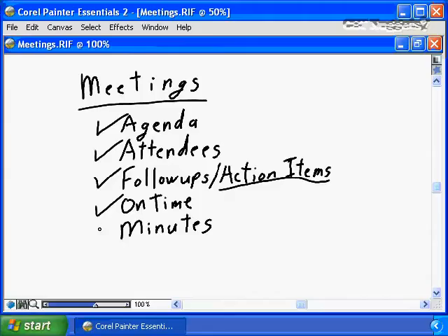And finally, publish minutes. Make sure that everybody is aware of the conclusions reached in the meeting. Make sure everybody is aware of the items discussed and that everybody takes the same vision, the same message, the same conclusions away that the meeting reached. And do that through well-documented minutes and ensure the minutes are published hopefully within 24 hours of the meeting's conclusion.